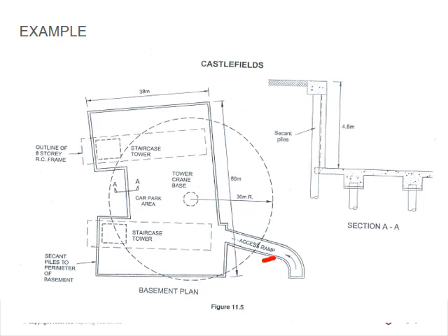And then there will be pedestrian access via scaffolding access towers. The volume of the excavation material is approximately 9,800 cubic meters, and the program duration for the works is 4 weeks or 20 days. Okay, so then they can calculate that they need X amount of trucks coming in. You will see on page 250 where they actually do the calculation of machine output. There are 25 loads per day that they have to take out.